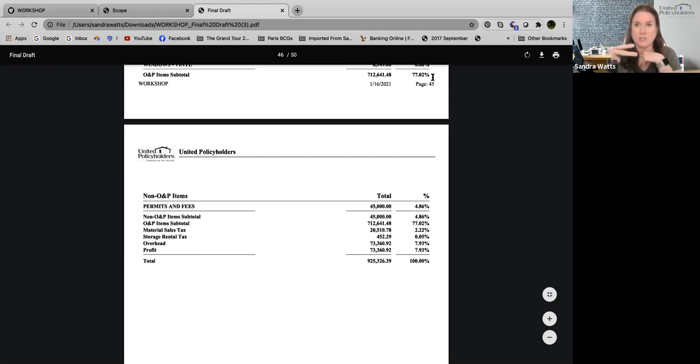The second option, and I do not recommend it, is if the policyholder asks, that's you, they have to produce a contractor that will rebuild your home for their price that's, you know, licensed and so on. They have to produce somebody who can do it for their amount, okay? I only recommend that in last ditch efforts. The third item, and that's the one that's most common, and it's the one that they don't know about. It's very interesting. But the third one is do a reasonable adjustment of the insured's estimate, which means line by line, okay? Line by line.